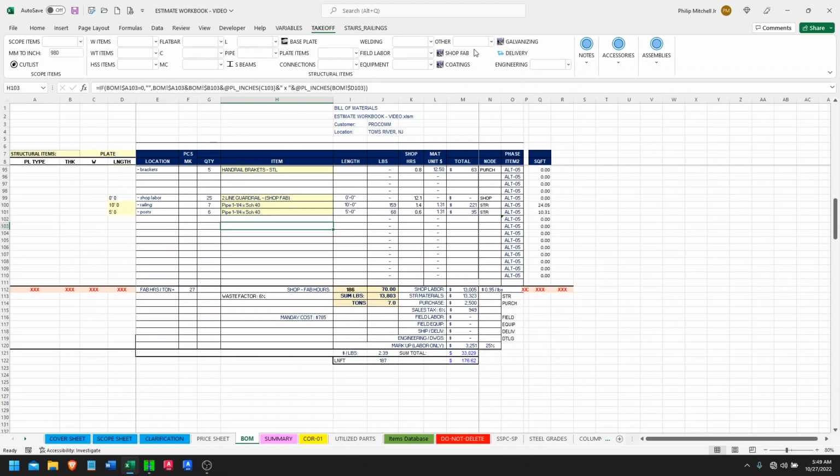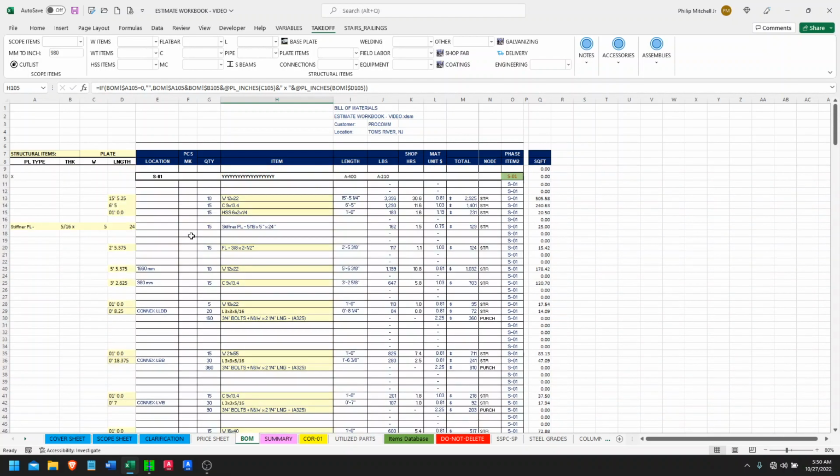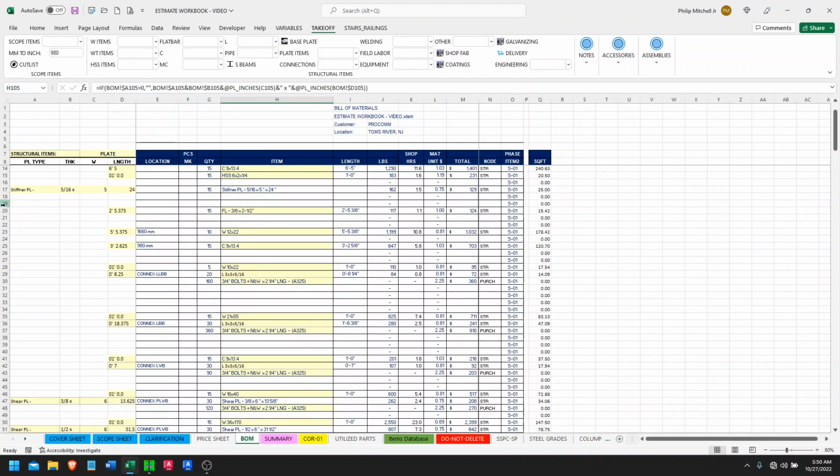So you know how much we're going to put in for delivery. So here's a description. This is just generic deliveries back to the job site. Miscellaneous metals delivery, that's a description. Then here's your galvanizer. Make sure you have shipping into the galvanizer or the anodizer. Okay, big thing. Coatings is a big one.